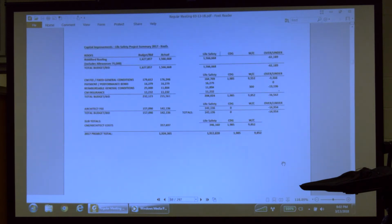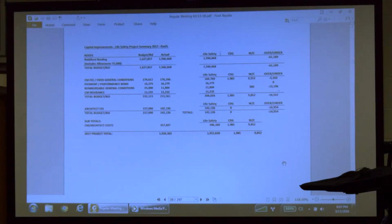And so one thing that we wanted to make sure we did, learning from the previous board and the previous administration, we wanted to make sure each part of the project was accounted for. So that's why you see bleachers are separate, the building separate, the field separate, the track separate, the tennis, the parking, the fence. Now, some of these subcontractors worked in multiple parts of the project, and so that's why you'll see their name mentioned multiple times. This is going all the way back to when Tim McGinnis was even still here, working with our construction manager, trying to break this out as specifically as possible so we could identify at the end of the day what the building cost at the athletic complex, what the field cost. That was one thing we weren't able to do with the previous project.